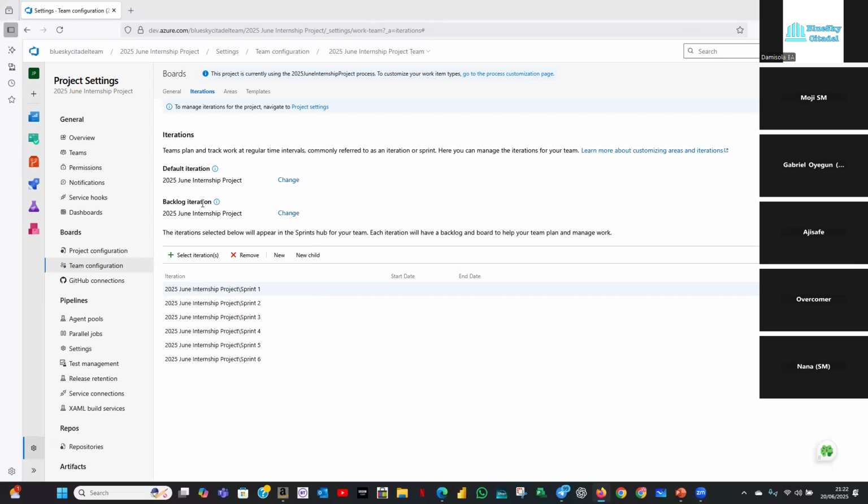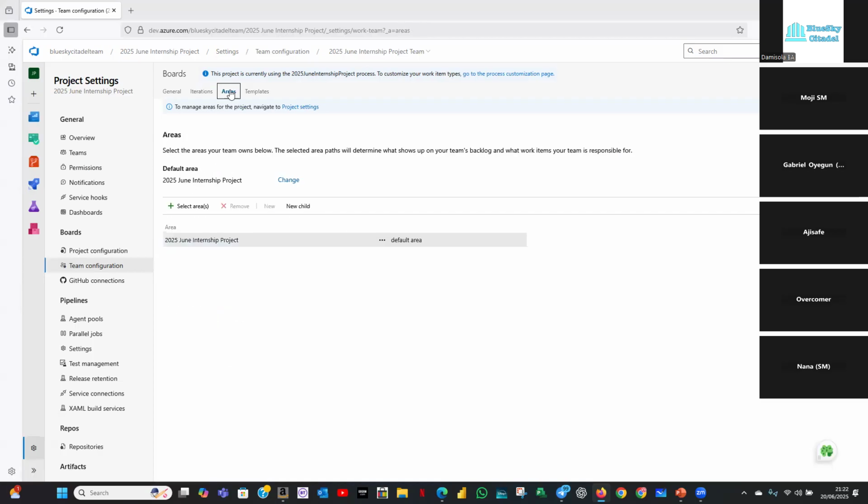And then you can see the backlog iteration here. We're not going to change this one. This one is in the right place. We're just saying with this one, during a particular sprint, when the BAs are working for the next sprint, we don't want what they're doing to be going into the current sprint. We want it to stay in the backlog. That's the change that we've just customized here. Okay. Any questions on that before, all right, let me just finish up.